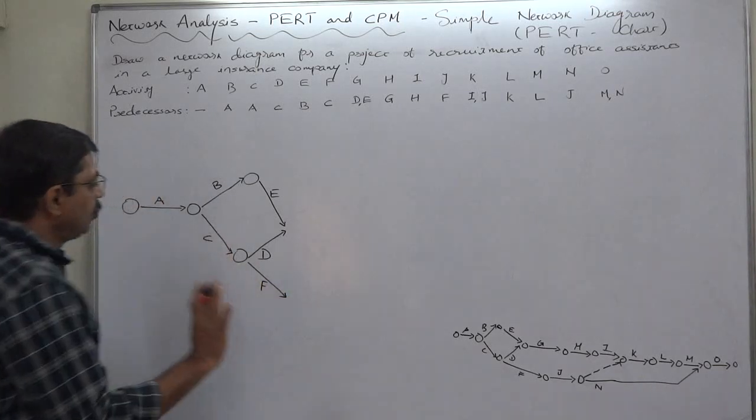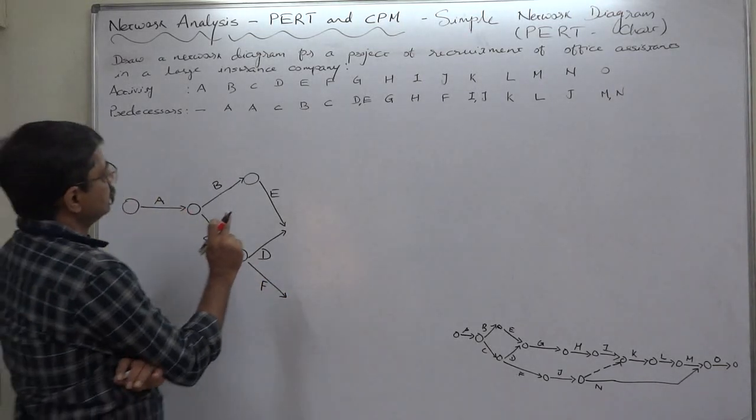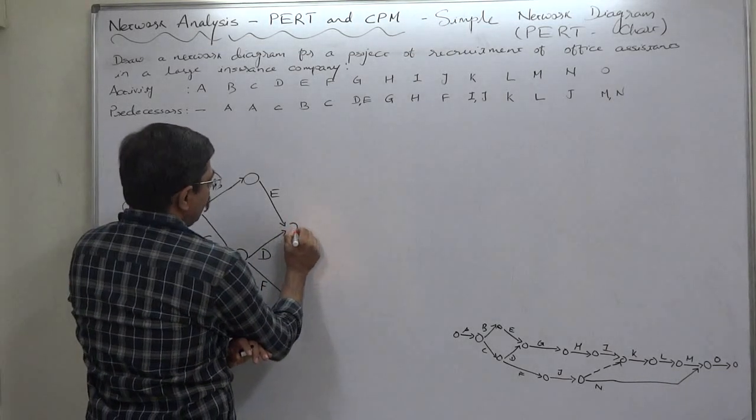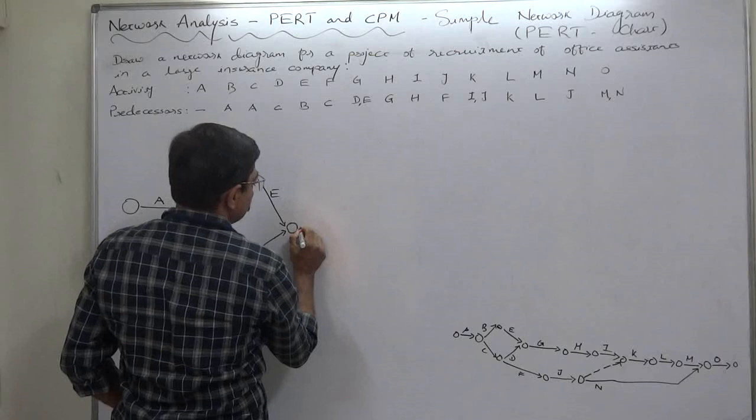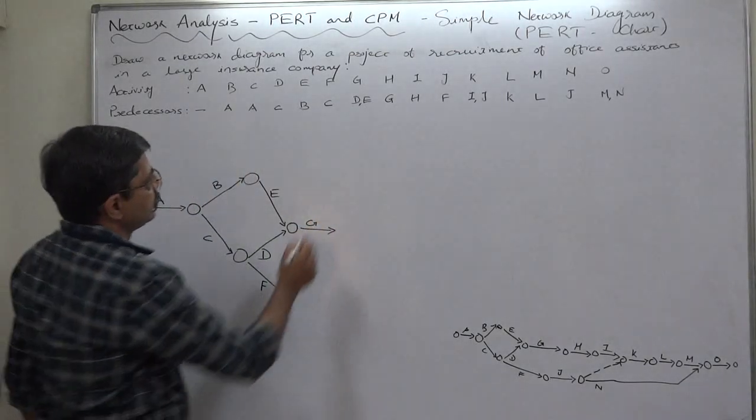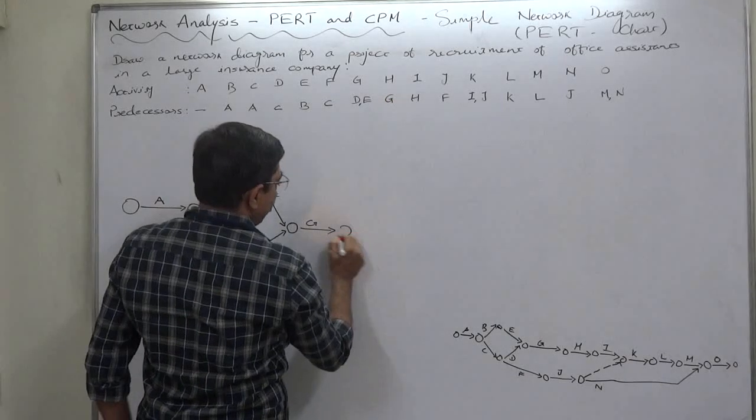Okay, now be careful. D and E are common predecessors of G. Now somewhat easier part: G is predecessor of H only.